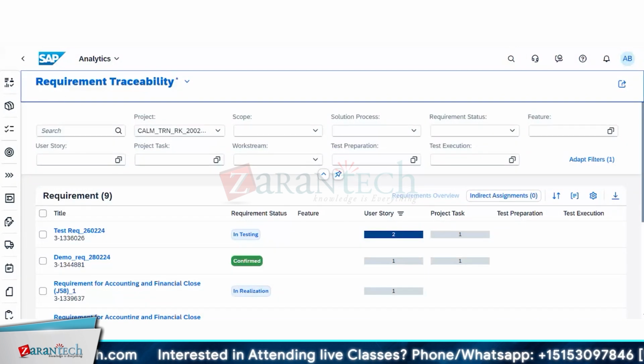So these tasks can run parallelly. You can work on the development and the testing team. The testers can create their test cases based on the inputs provided by you, and going through the FSD, TSD, right? So that's another planning you have to do. Some tasks would have to be done sequentially, like once the requirement is finalized, only then can you start with your development. That is sequential. Parallel, as I discussed, even when you are in the development realization phase, you can start with your test preparation, right?